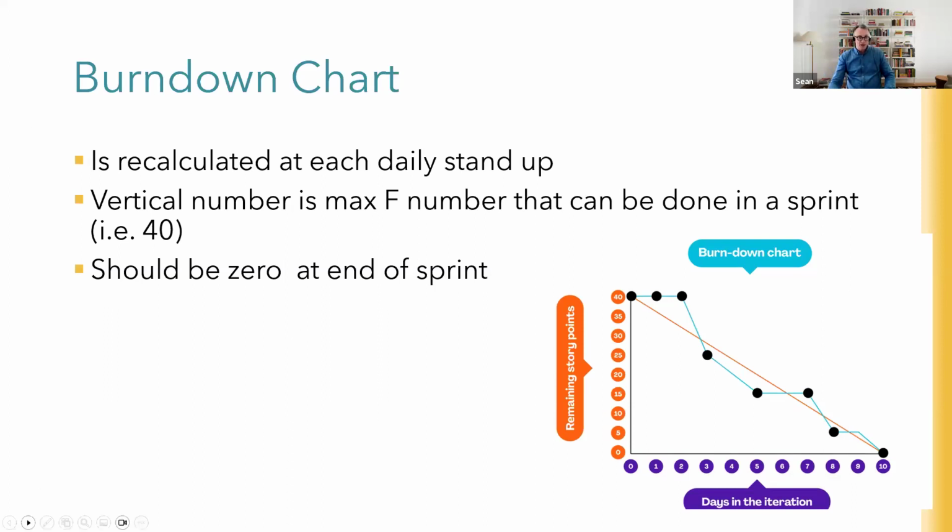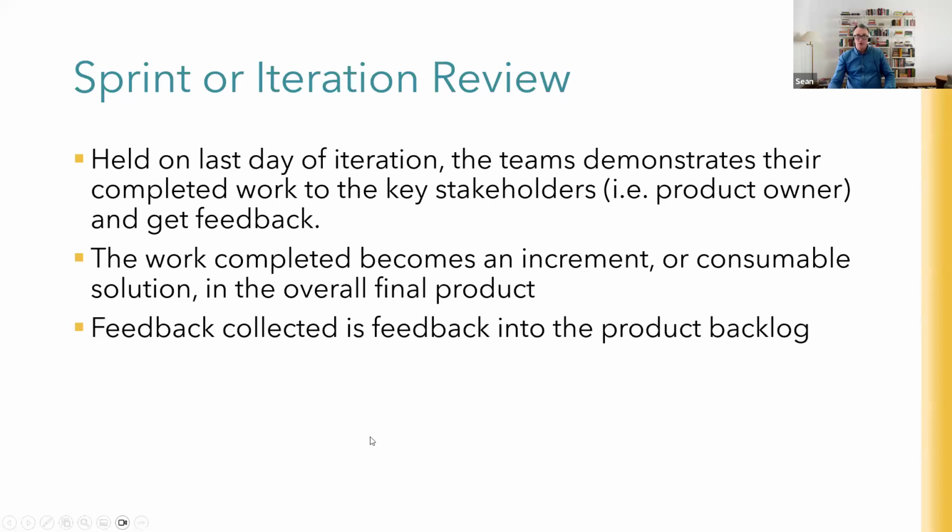As you're doing the Agile work, you will do sprint or iteration reviews, which is on the last day of the iteration. And they show the key stakeholders, the product owner or the user, what they've done, and they get feedback. Is this what you want? Is this the way you want it to look? Is this the functions you wanted it to do? And that becomes part of the increment, and that obviously all adds up to the overall final product.